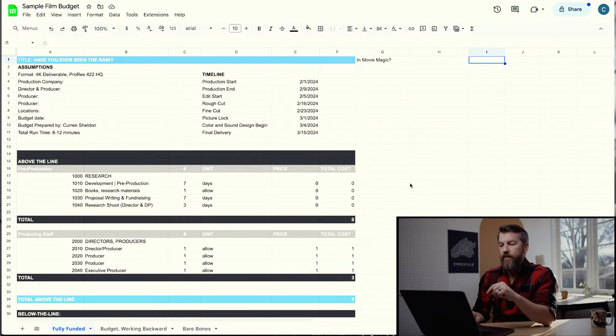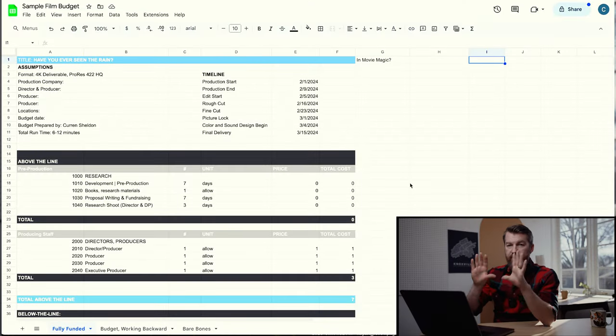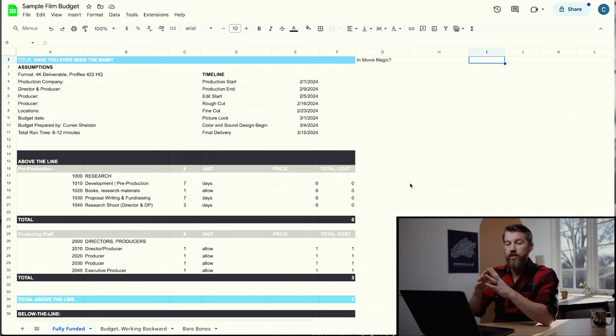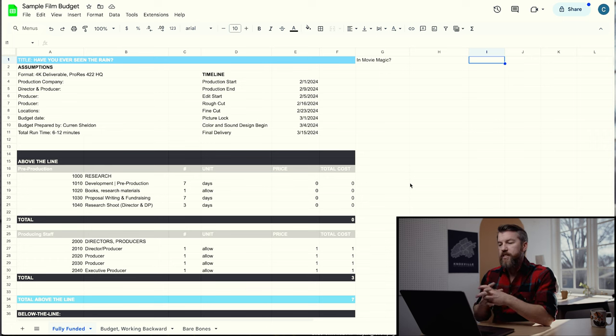The first thing that most budgets have is a section called assumptions — basically everything the budget assumes. This includes how many shoot days, where it's going to be shot, who's the production company, and who's the director and producer. These aren't necessarily etched in stone, but you're assuming this is how things are going to go.